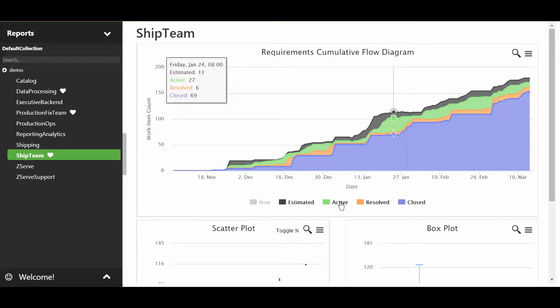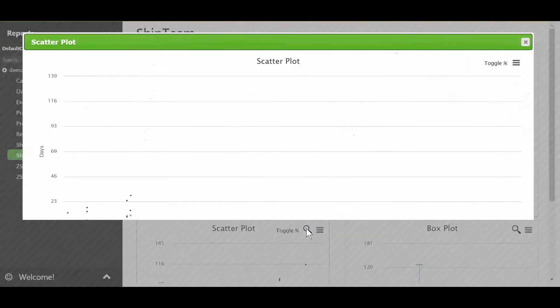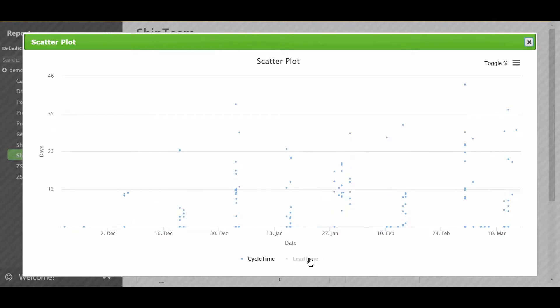First thing I'll look at here is a scatterplot. A scatterplot shows when they have completed their work, how long it took. So if I zoom into the scatterplot, we'll see we have a cycle time and a lead time. The cycle time is the time it takes from beginning to end once they start work to deliver it, and lead time is the time it takes from once it's in the backlog to deliver it.